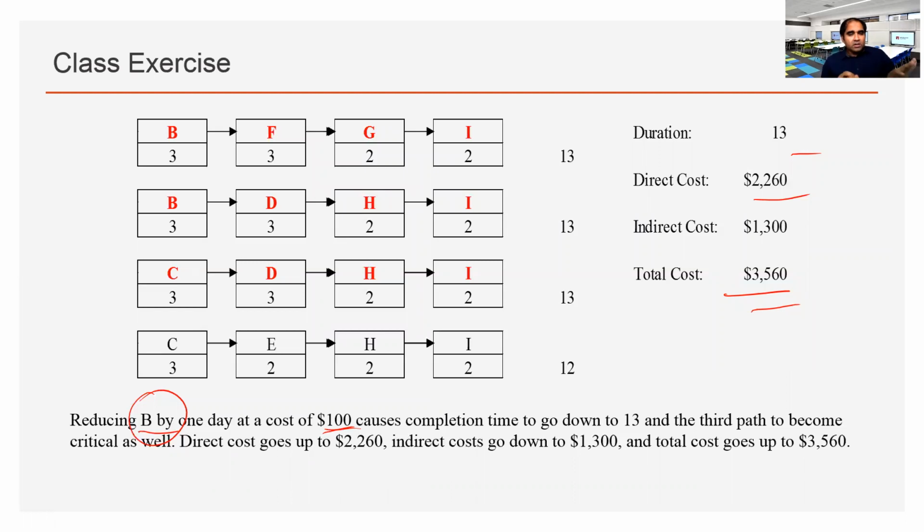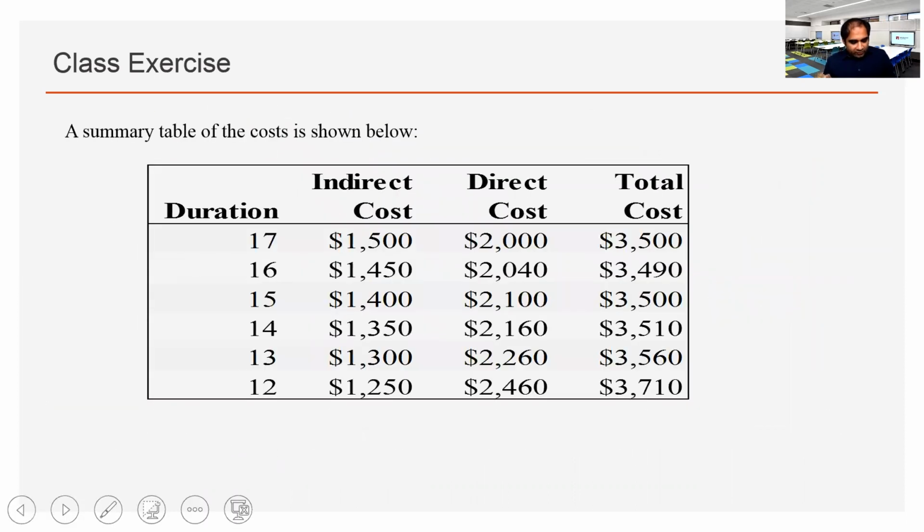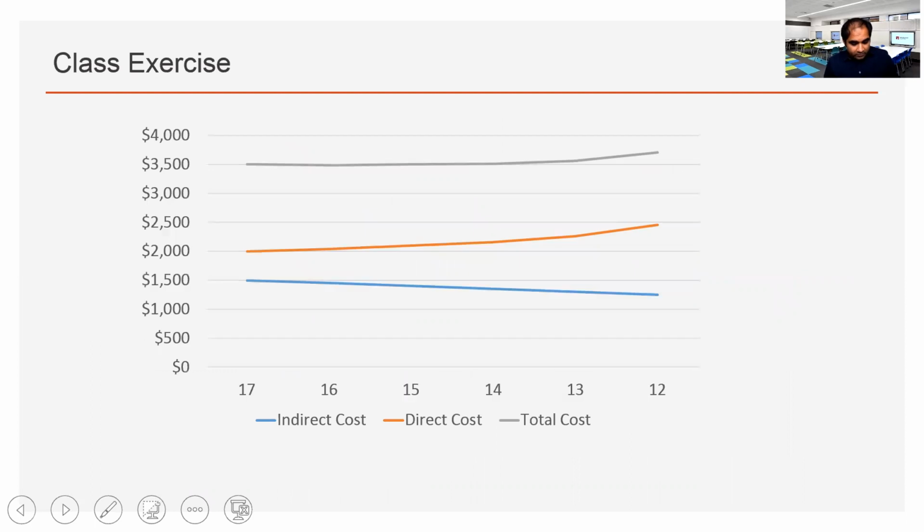From that point, whatever remaining balance of crash time we have, let's apply one by one by applying the principle of from the longest chain and the lowest cost, reduced by 1 day, get the total figure, and then plot the final graph.